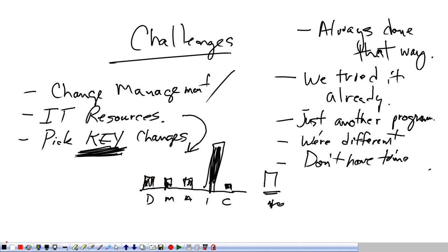And it doesn't take a rocket scientist to look at this and say, geez, you've got a lot of these stuck at improve. And so you ask the question, why? Well, it turned out that they had all IT changes that they were asking for. These were called system design changes, and they were called minor system design changes. So I did a little more investigating, and they had Q numbers like 257, 273. In other words, they were number 250 or 270 on the list. And when I talked to IT, they did about 10 a month. So they were never going to get to these things. Why they could just let them sit is beyond me, but they did.